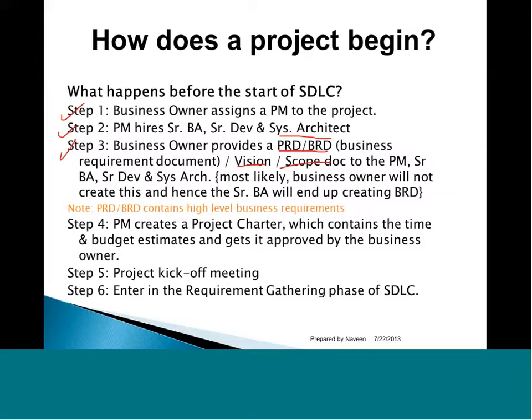So in reality, a senior business analyst may end up doing this type of work, or a product manager or a product analyst may even do these documents. These documents, which will contain high-level business requirements, would serve as inputs into subsequent phases of the project. Then a project manager will also create a project charter. What is this project charter about? We do have a template in our portal again. A project charter is nothing but, again, a high-level document that puts into the project the various phases, high-level milestones, high-level deliverables, and the timelines.